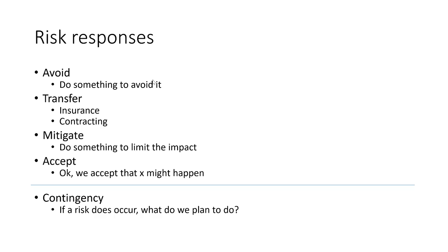Mitigating it is something to lessen the impact. So what would lessen the impact of running out of gas? Maybe you'd carry a can of gas. That way you could fill it up. Might be risk avoidance, but we'll call that mitigation. And you might just accept it.